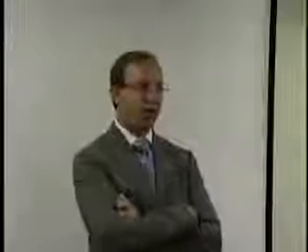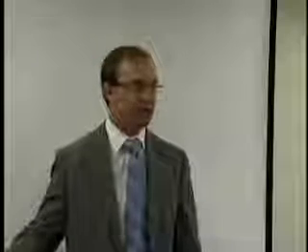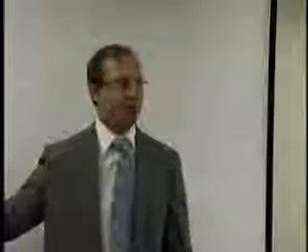So what do you do? Let's assume I'm representing a contractor. The contractor has all of this extra work, these change orders that were never signed, even though they have it written down. And this is always the case. They got it written down, it's never signed by the owner. What happens? Lien for the items that were done underneath the written contract. I have other counts like breach of oral contract, unjust enrichment, quantum meruit for all these extras. We have other claims for that, but it's not going to be stuck into your lien.